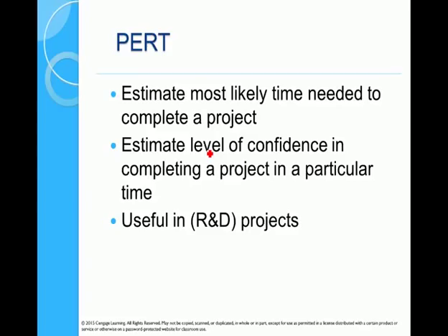So just quickly, a review of PERT, Program Evaluation Review Technique. It is exactly the same as CPM, Critical Path Method, except for instead of having one duration estimate, there are three. We have a pessimistic, that's the longest it could take, an optimistic, that's the fastest an activity could be completed, and finally a most likely. The technique then looks at what we call an expected value. We won't be going through that. You can skim through this part of your textbook.